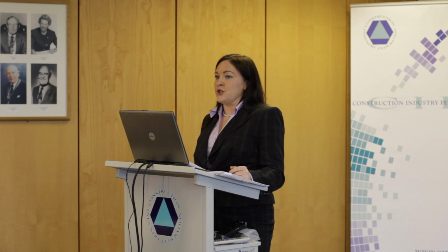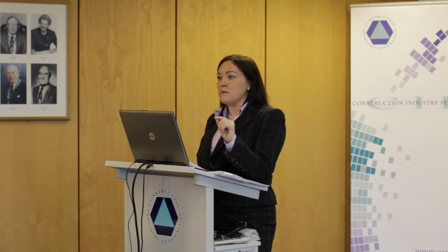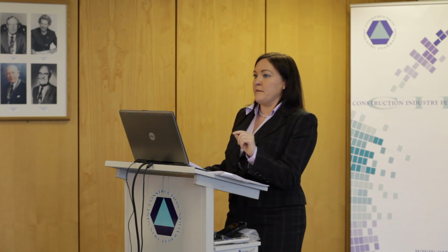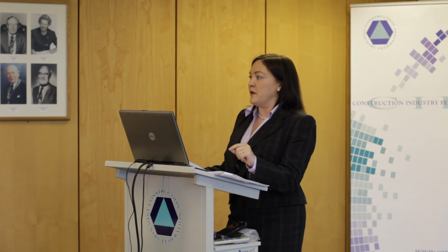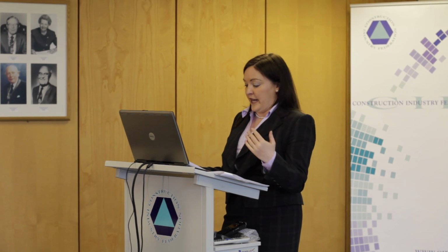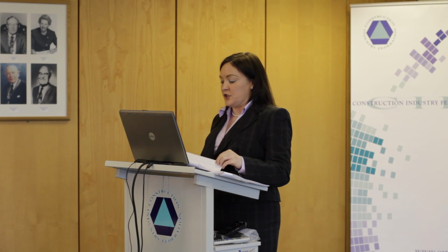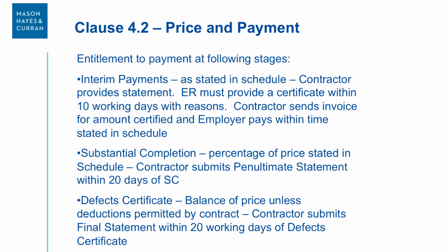If you get an oral instruction, you put it on paper. So you say, as noted, you've instructed us to do X, because the EOR will come back fairly quickly if he did not mean it as an instruction. Again, you'll have the barney at that point, but make sure that you put it in writing, because if you put it in writing and he doesn't do anything, then that's an instruction and you can always rely on that instruction. So next then is price and payment in clause 4.2, which is on page 4 of your contract there.